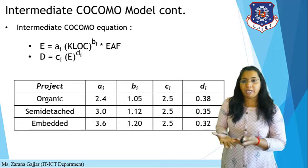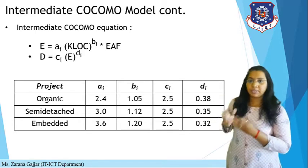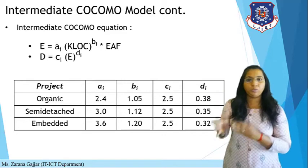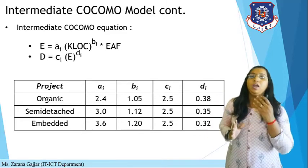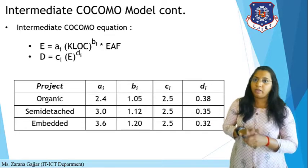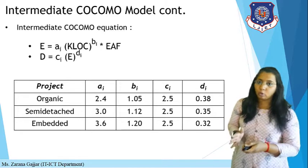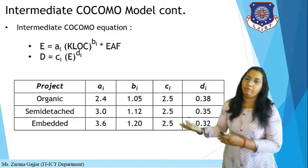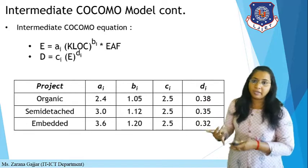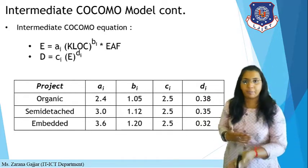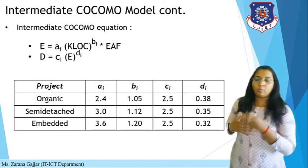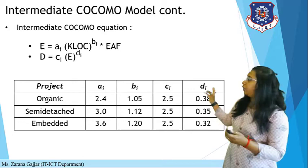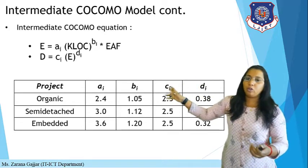For the intermediate COCOMO model, the formula is almost similar to the basic COCOMO model, except that in the effort formula, we multiply the basic value by the EAF. EAF stands for Effort Adjustment Factor, derived from the 15 parameters. Once you calculate effort, you can easily calculate development time. E is effort and D is development time. The constants for organic, semi-detached, and embedded types remain as defined in the basic COCOMO table.